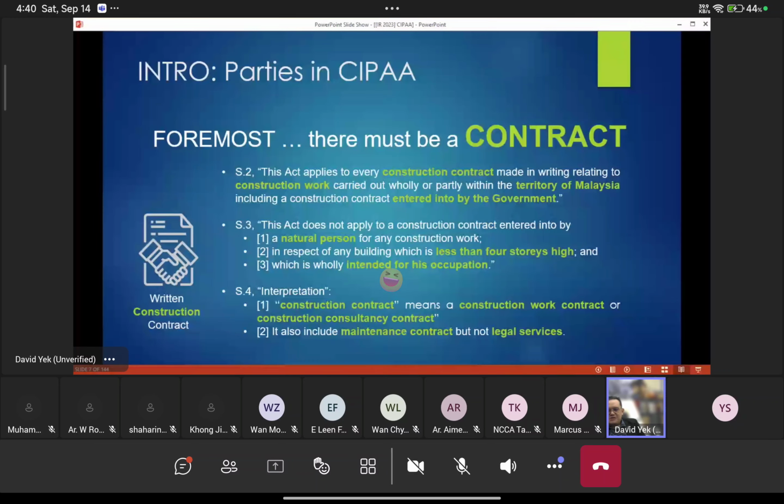So can "paid when certified" be construed as a conditional payment clause? The court's interpretation is that it is not. It is not a conditional payment clause, even though payment can only be made on the condition that the certificate is being issued, right? But the position of the court is that "paid when certified" is not construed as a conditional payment clause. Therefore, paid when certified is enforceable. Okay, so to be clear about this,